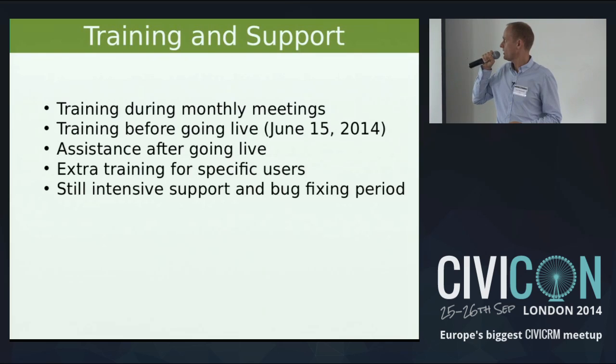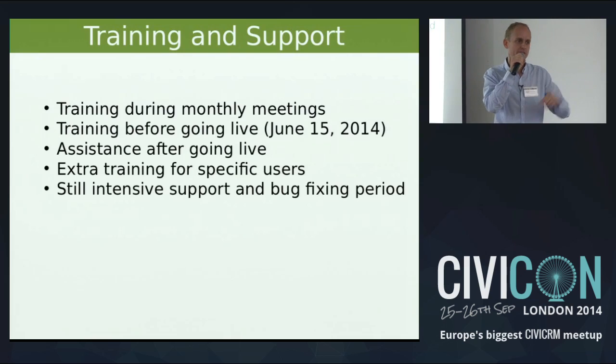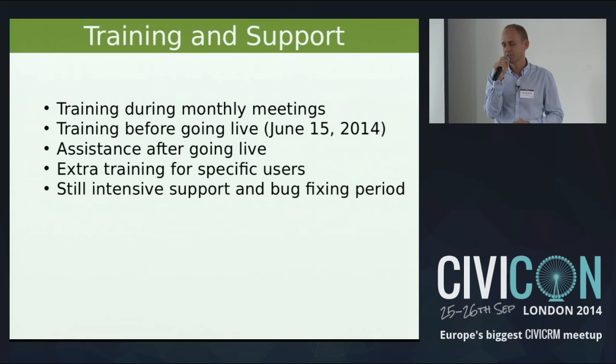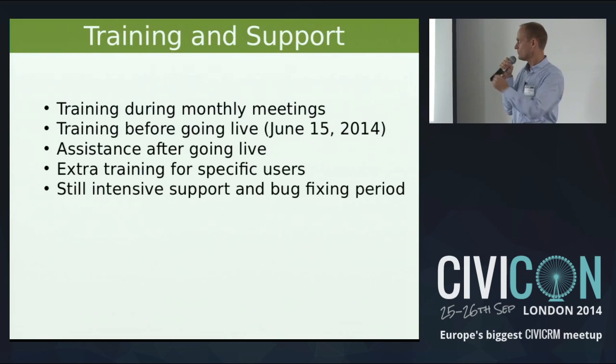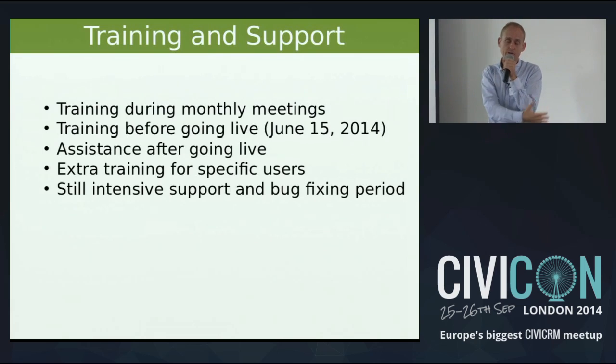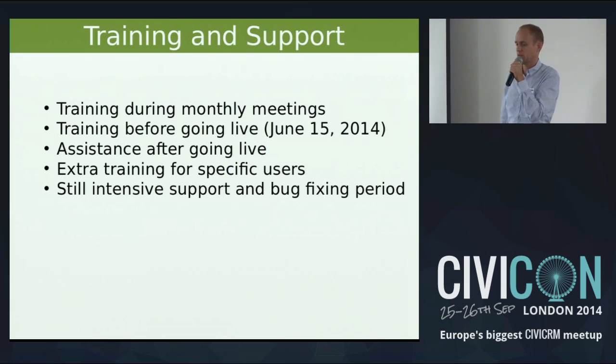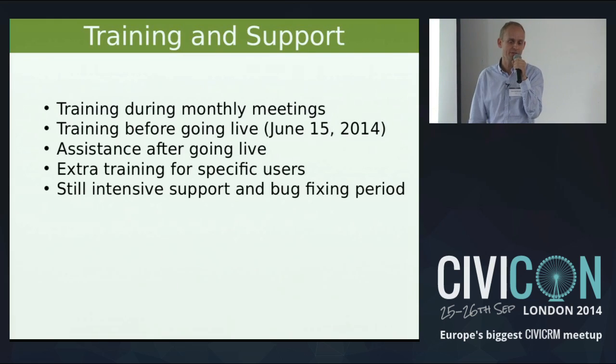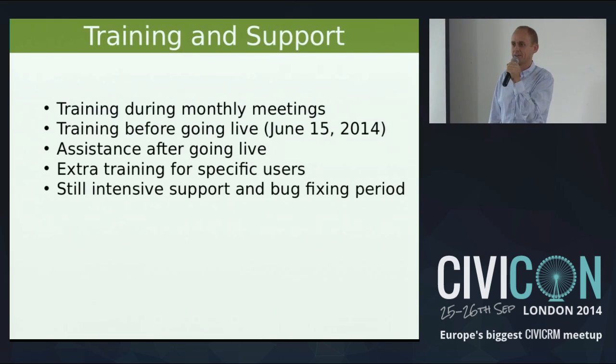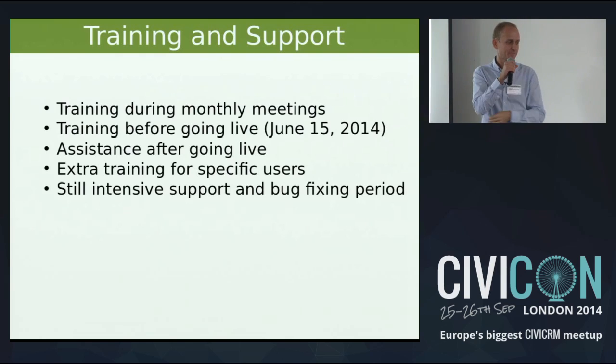We also arranged some extra trainings for users who were not involved from the start, because we could not stop our business every month and have discussions with users. So not all users were in these monthly meetings, and for the other users we arranged a few extra trainings. We had one last week for a specific group. And still now, we are in a period of intensive support and bug fixing, because we had our fair deal of bugs, which is normal when you do software development. We didn't have a major issue, I think. There was a new issue during the presentation.